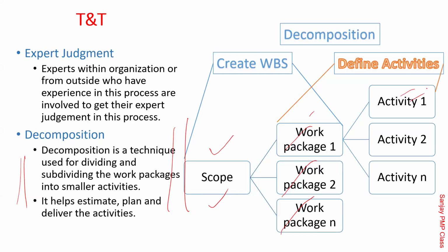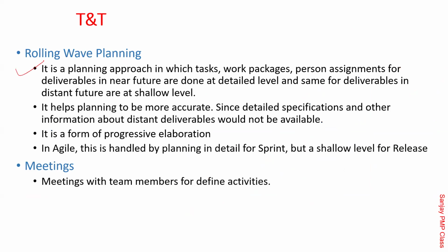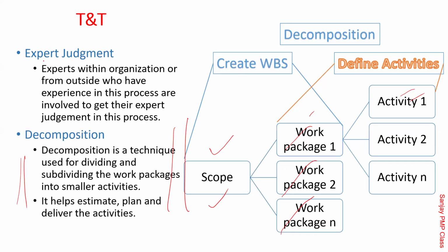Rolling wave planning, very clearly what they are trying to say here. What they are trying to say is that the work packages on which you are going to work in the next sprint or next timeline, do break them into activities.